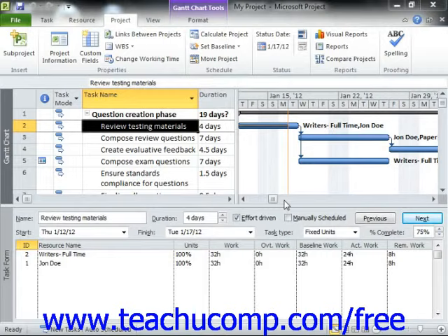One reason that you can do this is that some tasks can be front-loaded or back-loaded, meaning that the majority of the work is incurred at either the beginning or end of the task's marked period of duration. In these cases, too, you may need to update the actual work progress made on the tasks, which may not correspond directly to the task's duration or percentage complete.